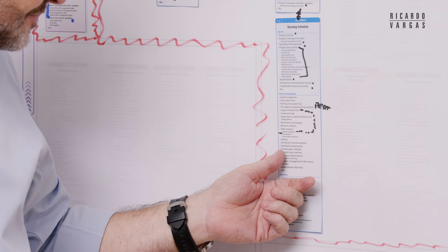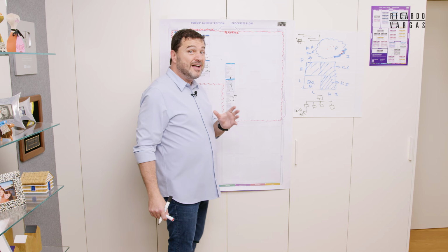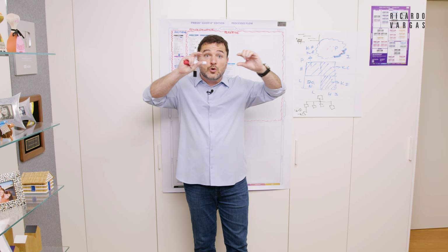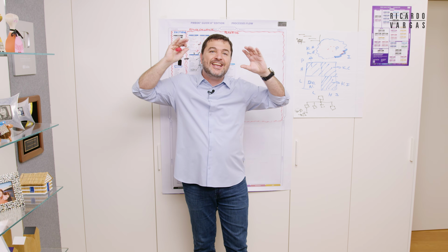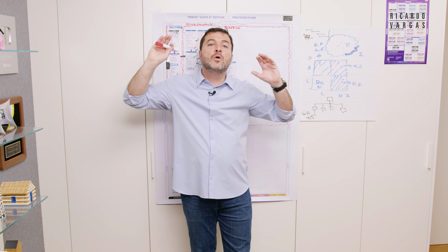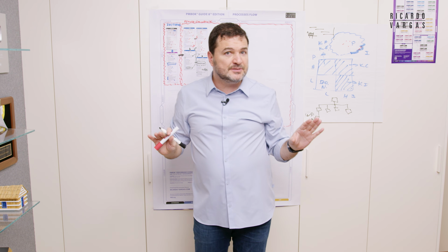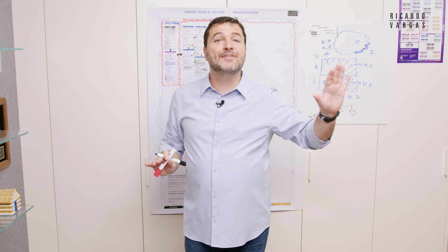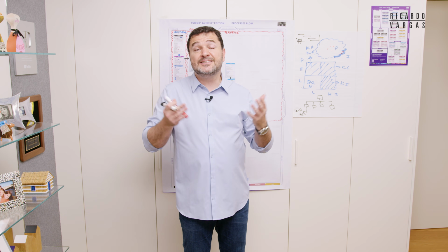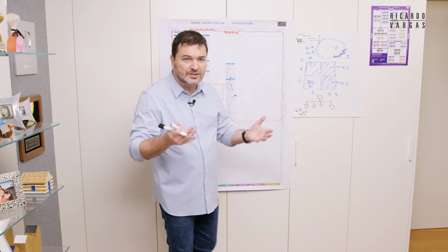Then we have the critical chain method. This is a very unique method where you use the theory of constraints and you calculate your critical chain and you protect your critical chain in the best possible way using buffers to make sure that your chain will not be changed. And this is a topic, honestly speaking, for a whole course that is above and beyond the PMBOK. If you want to know more about that, there is a book called Critical Chain Project Management, and the author is Lawrence Leach, and it's great. And of course, if you want to read about the whole concept, there is, I would say, one of the most important books in management, the book by Eliyahu Goldratt called The Goal, that talks about critical chain, okay?